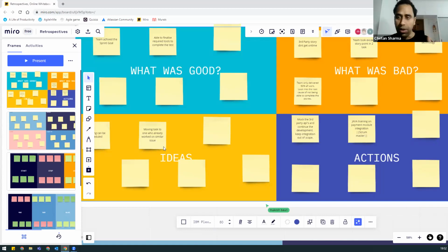Second thing is, we got the training, but still we feel we need some support from this guy who already worked. So make sure this guy has sufficient bandwidth in the next sprint so that he or she can support the new team member who's going to work. So when we are planning the work for that guy who already worked, make sure he or she has sufficient bandwidth to support the team members. So for these kinds of actions, there is a specific time where we can do that. Identifying the gaps, making a plan during refinement,